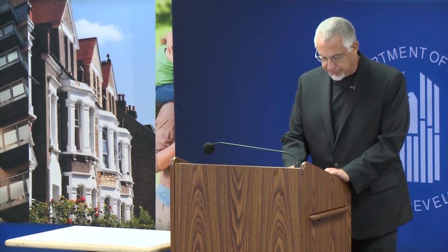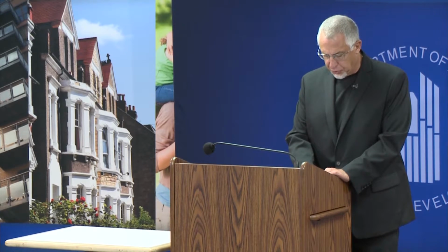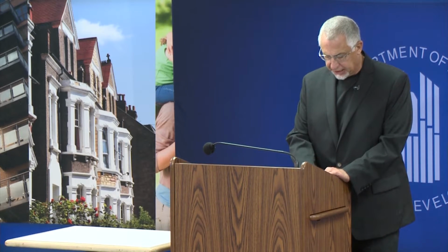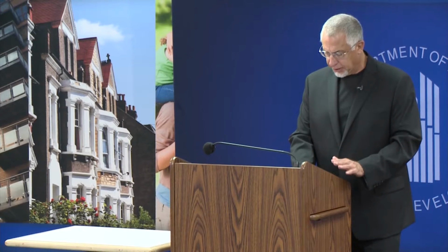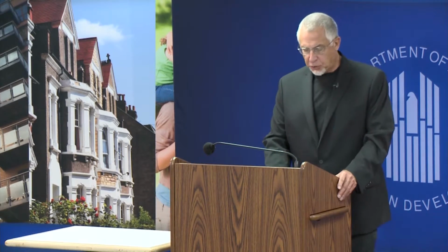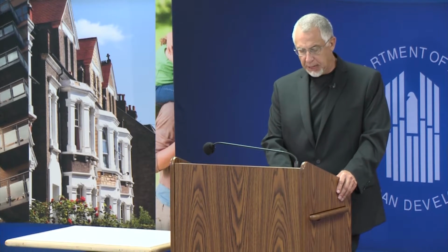And down at the bottom, the micro purchase threshold is set by the Federal Acquisition Regulation. It is $3,000 except as otherwise discussed in subpart 2.1 of the regulation. But this threshold is periodically adjusted for inflation. And that is what has happened since the UG was published.